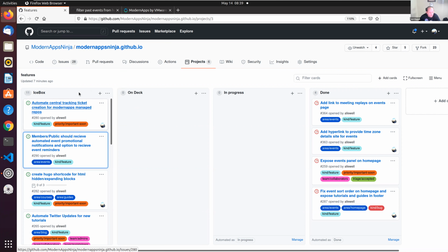Now, fortunately, we already have some workflows. It's pretty easy to make an API call to GitHub to say, open an issue ticket with this context. And so to resolve this one, what we'll need to do is, on a given repository, have a GitHub workflow that looks for the event called new issue ticket.